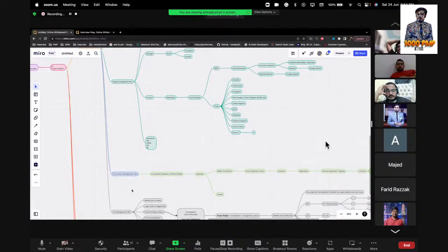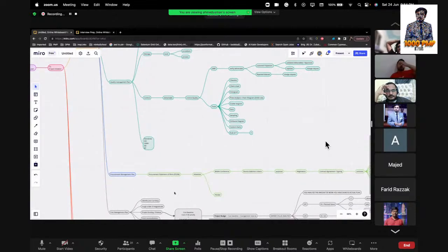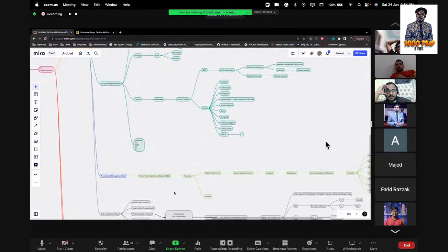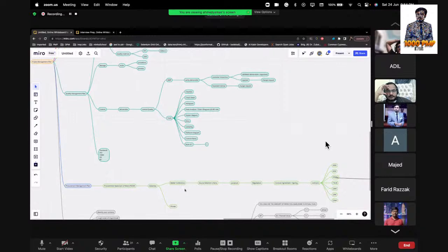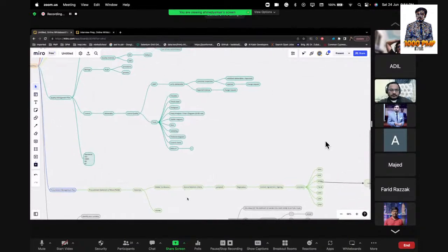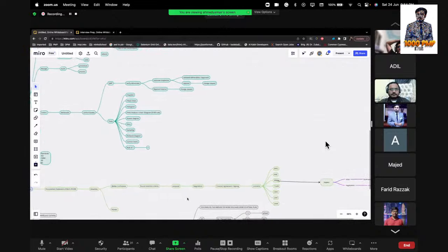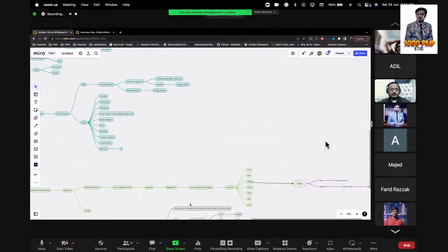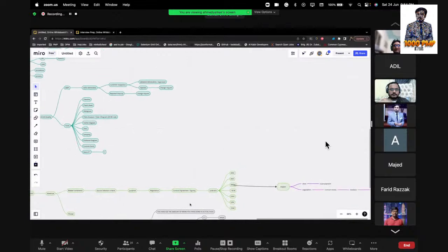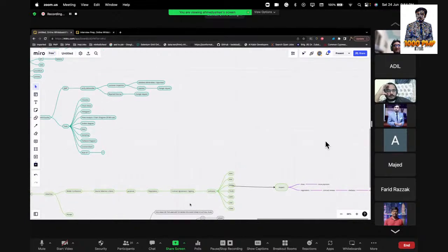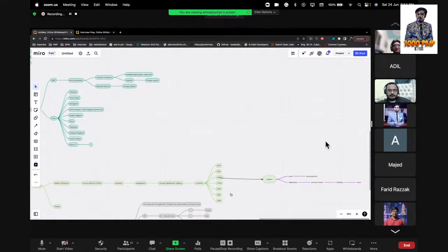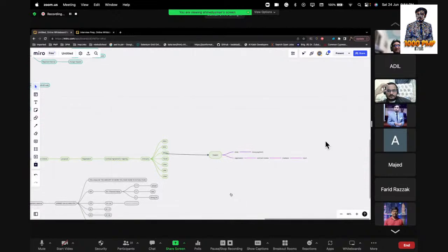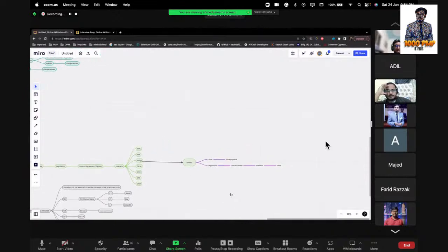Under procurement, we have this procurement management plan, where first of all we are preparing the procurement statement of work. The process is to advertise first, and then the bidder conference. We need to define the source selection criteria, proposal, negotiation, and then we move towards the contract signing agreement. It depends on the terms and conditions. We have different types of contracts: FFP, FPIF, FPEPA, T&M, CPFF, CPIF, CPAF.